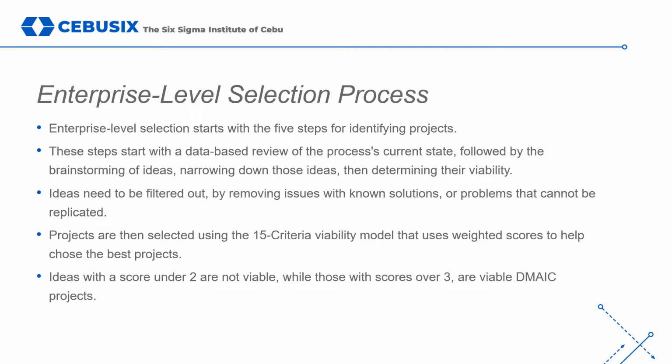After removing project ideas that don't fit Six Sigma methodology, teams should create and apply business criteria to further filter the list. Business criteria usually come in the form of expenses, monetary gains, impacts on customer satisfaction, and urgency. Using the business criteria, teams should prioritize projects and select projects from the top of the prioritized list for immediate work.